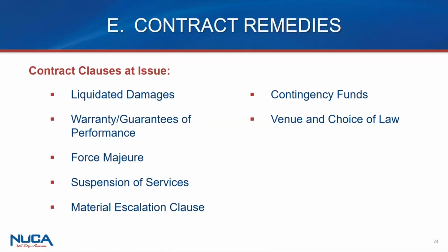Tom touched upon this on public jobs, contingency funds. When you educate the owner and let them know that these are possibilities, let them set aside a piece of money that is there to protect the owner and the contractor so that they have those funds to keep pushing the project through.